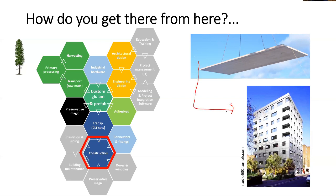But how do you deal with CLT panels? The first thing that comes to mind is not that the large panel enables prefabrication — actually it's the other way around. The large panel prohibits custom fabrication on site. So including prefab in this is a necessity, not an option we choose in order to become an Industry 4.0 operation.